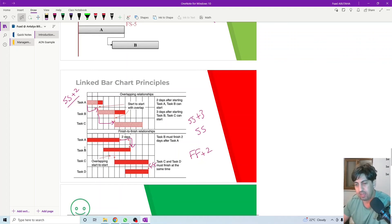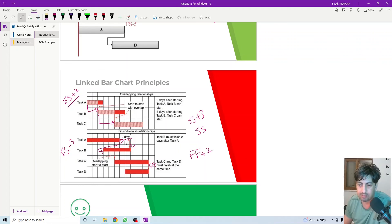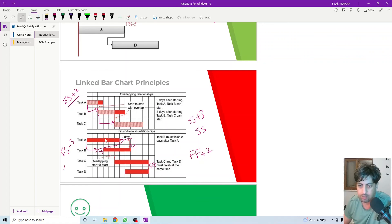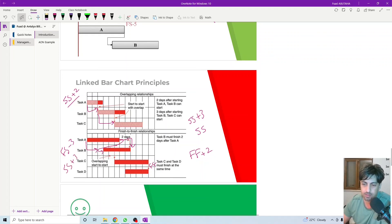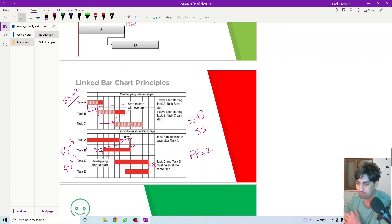If we need to connect activity A and B from finish-to-start, it would be finish-to-start minus three — a negative lag. If they are linked start-to-start, it would be start-to-start plus three. We don't have different types of relationship for the same two activities. We must have one type of relationship: either finish-to-finish, finish-to-start, or start-to-start. You need to pick only one — they cannot be restricted with two types of relationship.